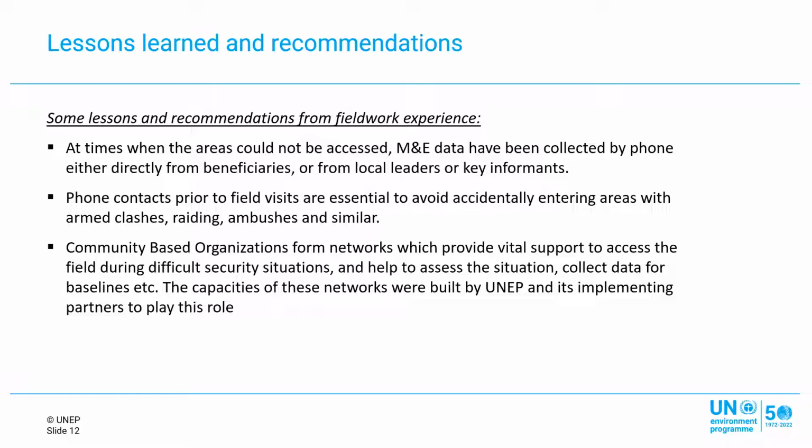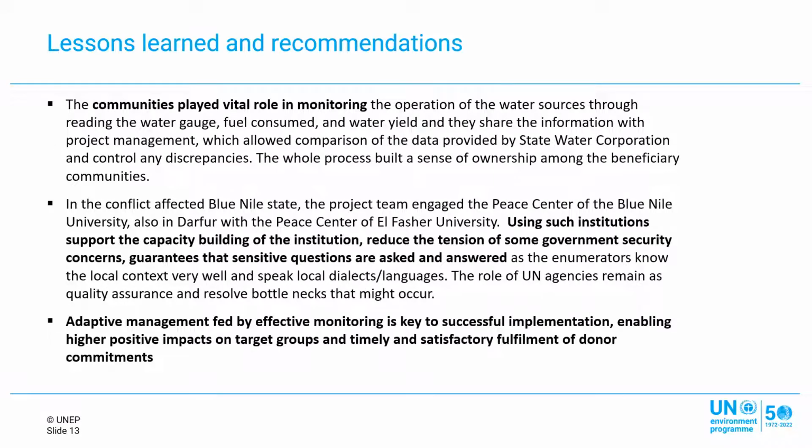Sometimes we had to outsource the monitoring. There are quite strong networks of community-based organizations, especially in Darfur, and they provide vital support to access the field first and also collect data and baselines and report back to our monitoring and evaluation officers. We had to invest in the capacities of these networks, but that was, I think, quite a good move for the sustainability of the projects after we leave. So as I said, the communities played a vital role. So you get the information from the communities.